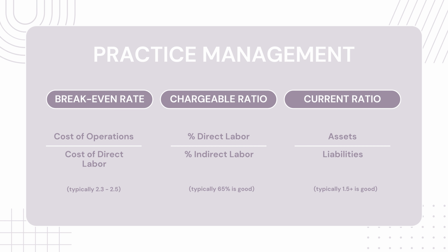If the percentage is not provided on your personal timesheet, try tracking your own time at work and calculating your chargeable ratio just for practice. Remember, direct labor is time spent working on a project that makes the firm money. Indirect labor is doing anything else, like marketing or even filling up a stapler.